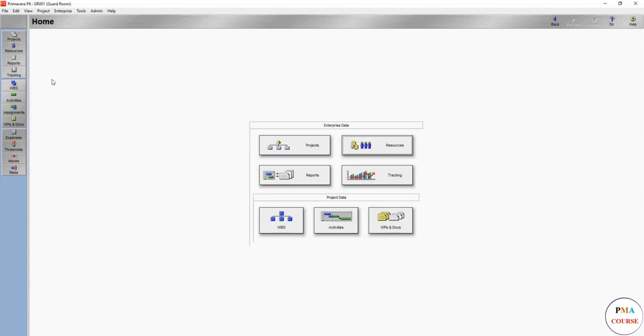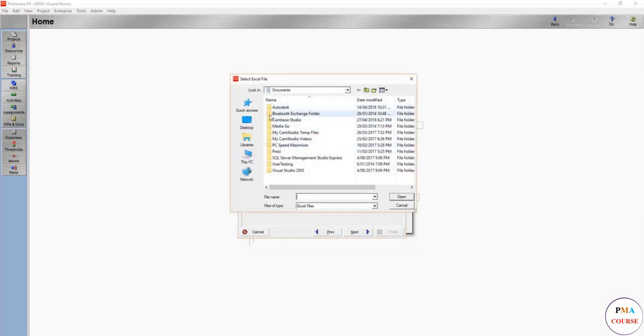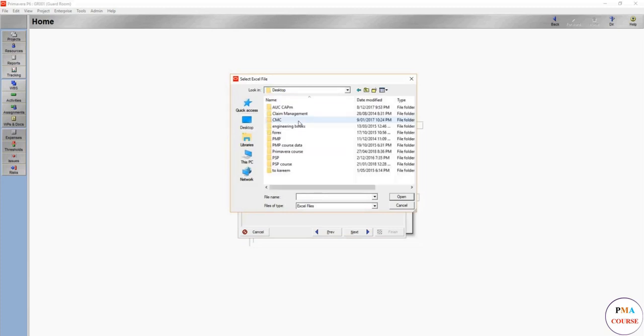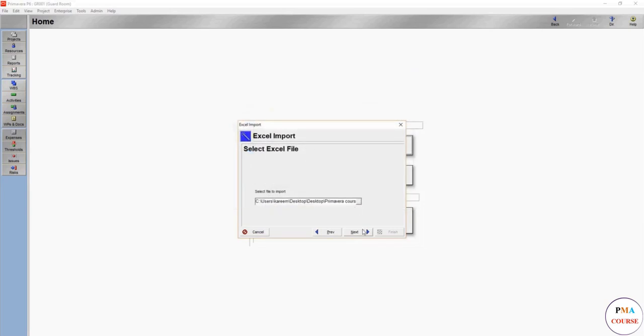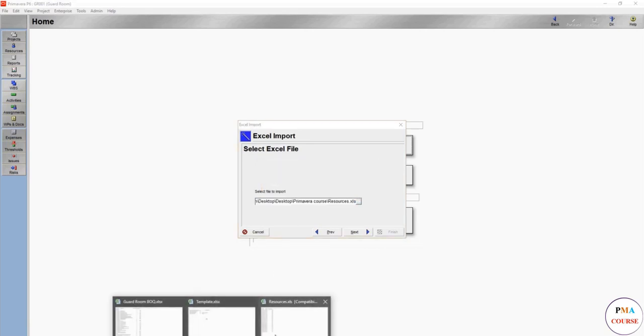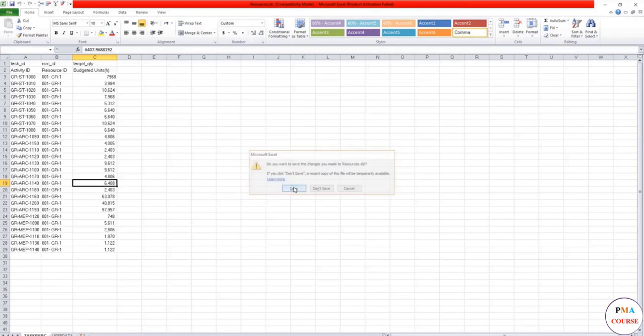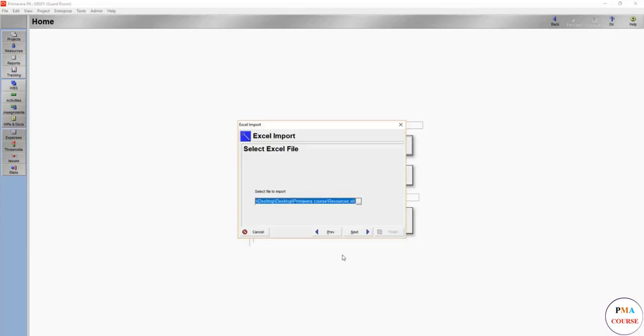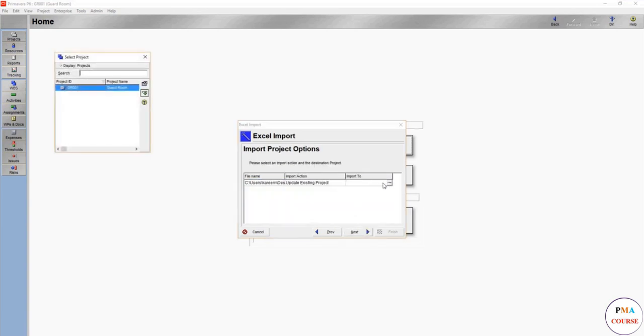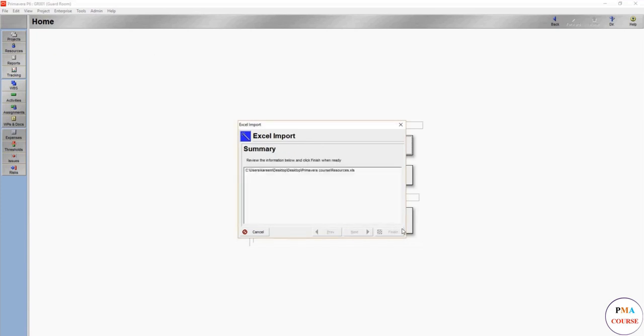So now, File Import. Our file that we have just prepared, Spreadsheet, and let's go to our file. Change this. It's here. Valid file name. So let's close this file for any reason. Let's see how this works. Here it is. Resource Assignments. Import. To check, it's only one project. Finish.